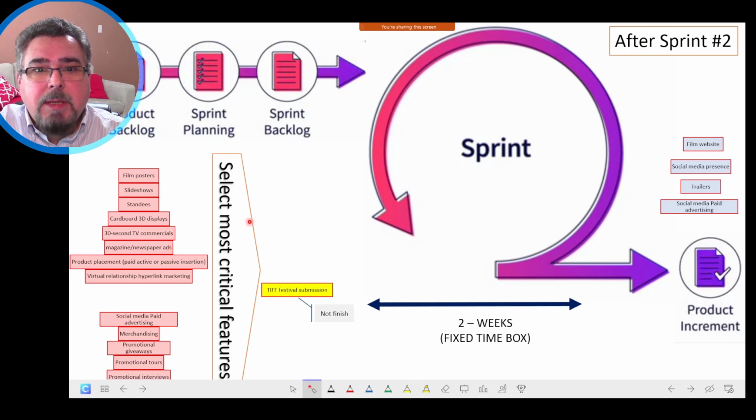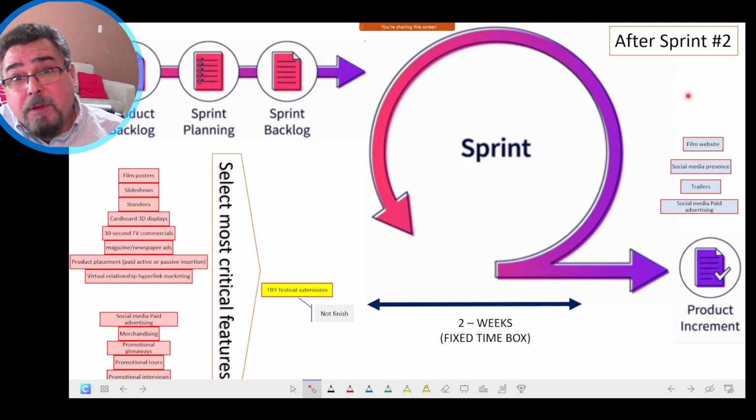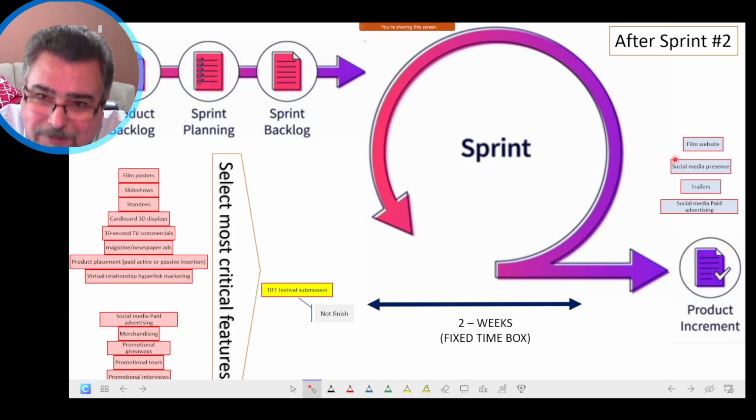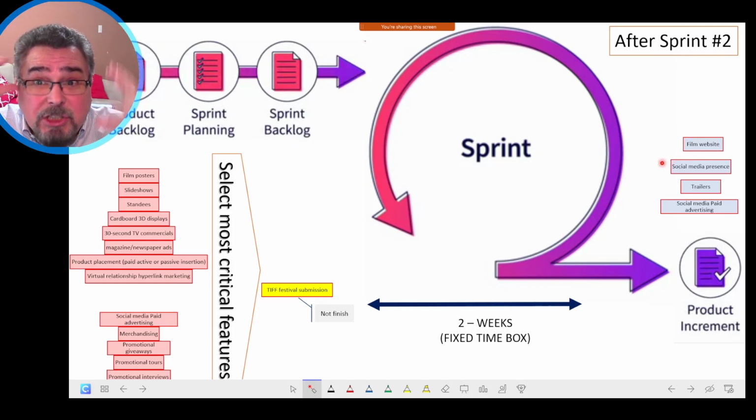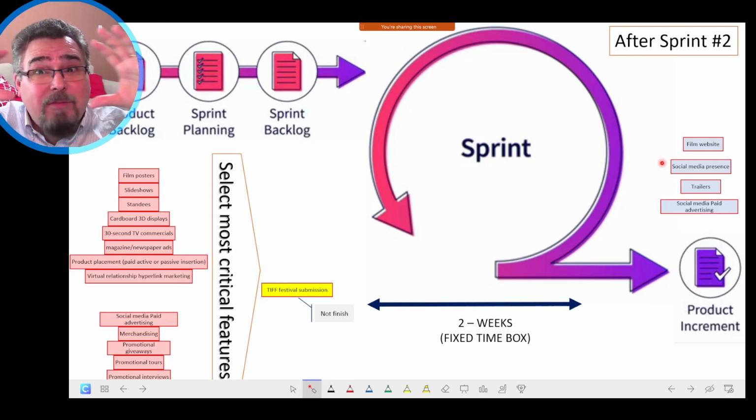And so they will bring that from the product backlog, move that to the sprint backlog, and during the third sprint, that now would be November 1st to November 15th, you have that third execution cycle, and you will be picking up maybe some elements and executing. So you'll be releasing some features, some components, and go for the fourth cycle, and so on. So that's the idea of Agile Project Management. Very high level idea, very high level.